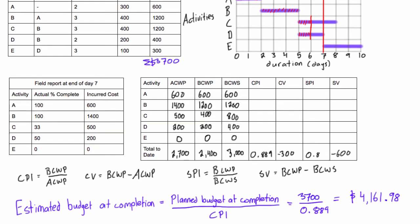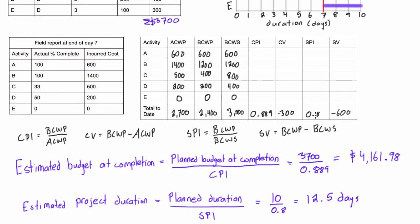And again this makes sense because from our earned value analysis we learned that our SPI was less than one, so that told us we are behind schedule. We were behind schedule at the end of the seventh day, so if we continued on that track, we would expect the entire project to be behind schedule. This is saying exactly that - we are expecting if we continue at this rate that we'll finish the project in 12.5 days instead of 10.